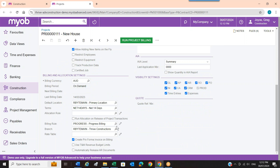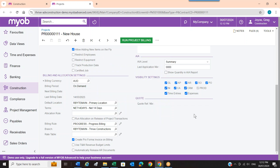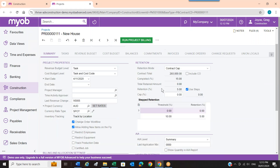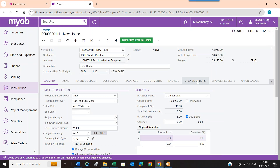A couple of things that change on the summary screen are the billing type and the retention. One of the really nice things about this product is it does all sorts of different billing types: this one is set up as a progress bill, but I could also do cost plus billing, time and materials billing, or work in progress billing. It's very flexible in terms of how you want to run any particular project. The retention module is also set up here and can be configured in a couple of different ways.